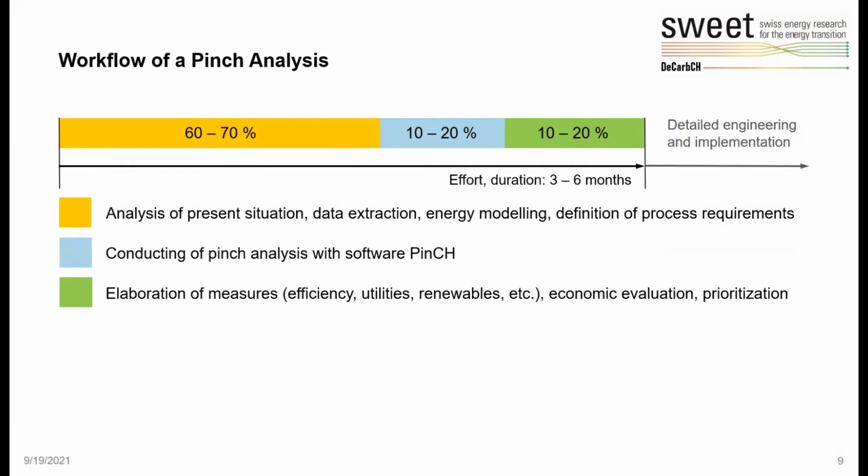This is largely due to the data extraction phase, which normally requires up to 70% of the project effort, and the difficulties in understanding the process energetically from a systematic perspective and concretely identifying the process requirements actually needed for conducting the pinch analyses and understanding the energetic behavior. The length of this phase directly impacts the costs of any energy optimization project based on pinch analyses.